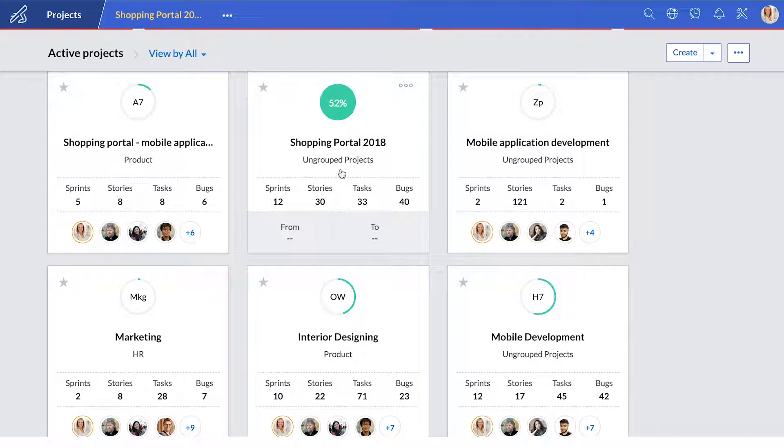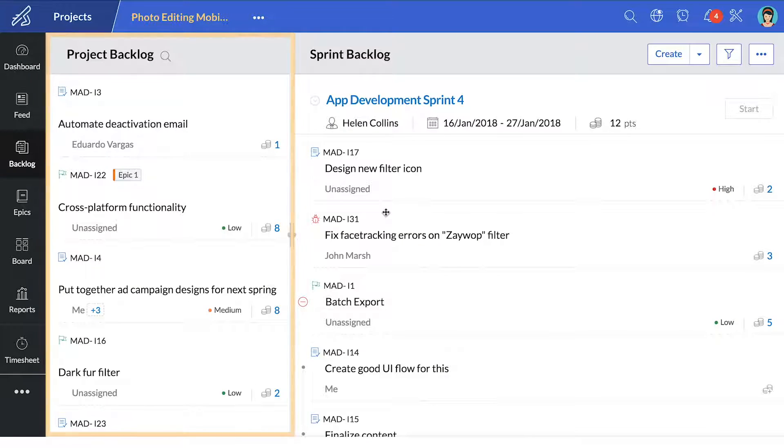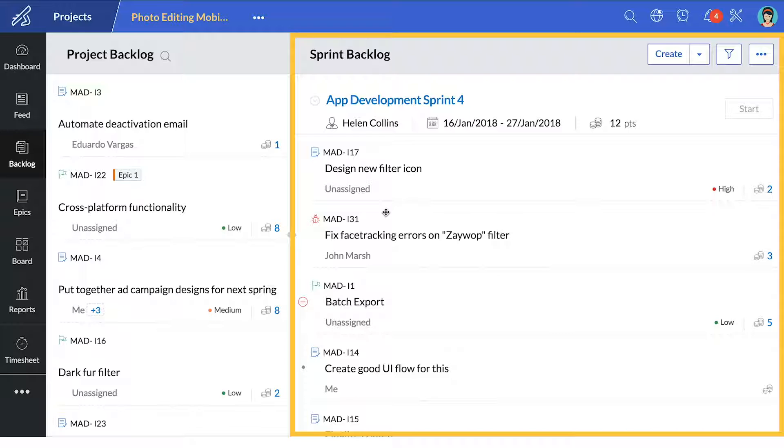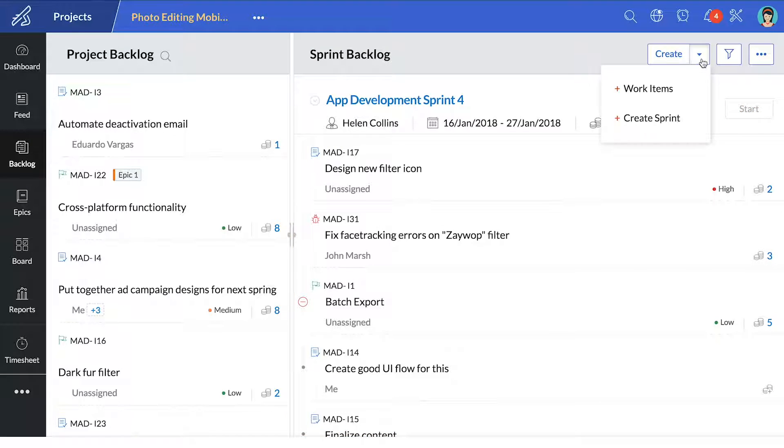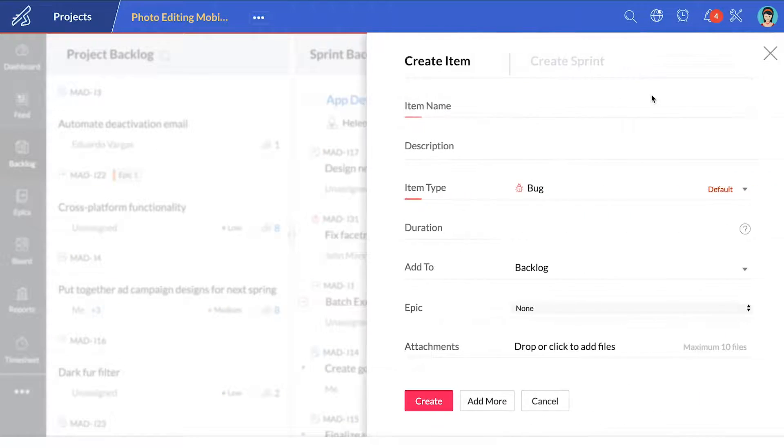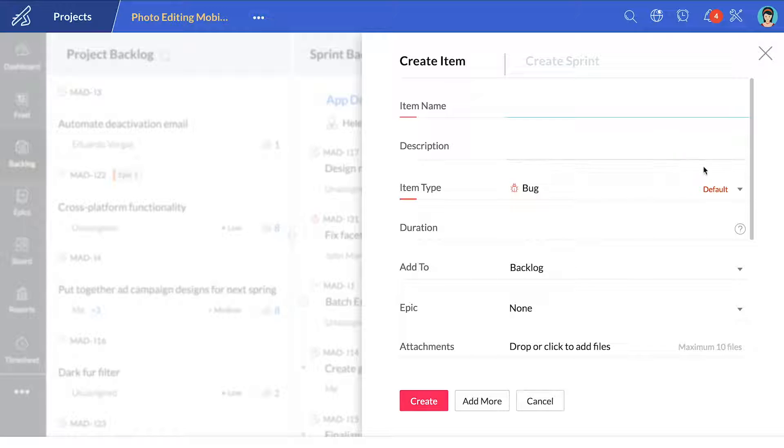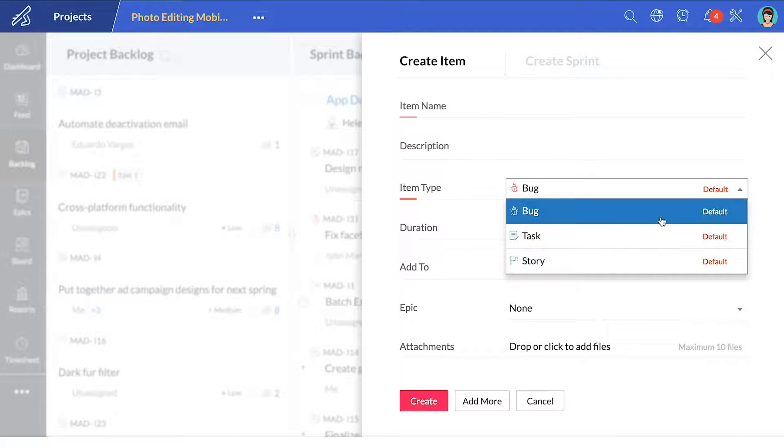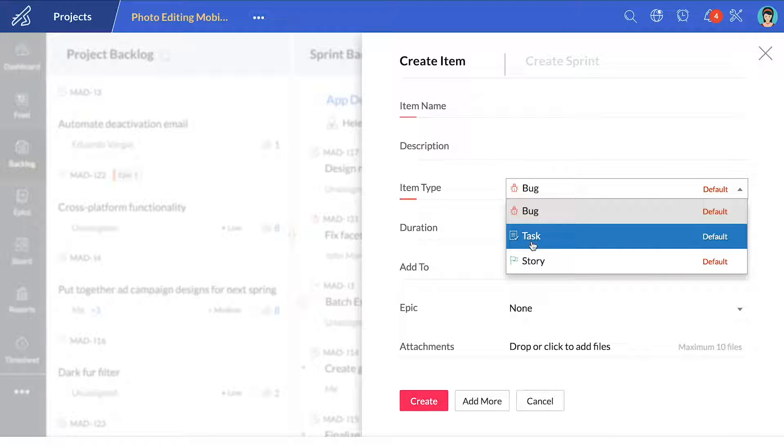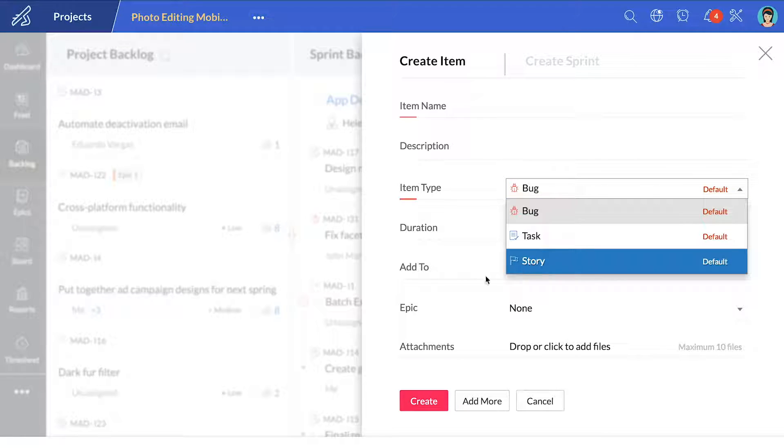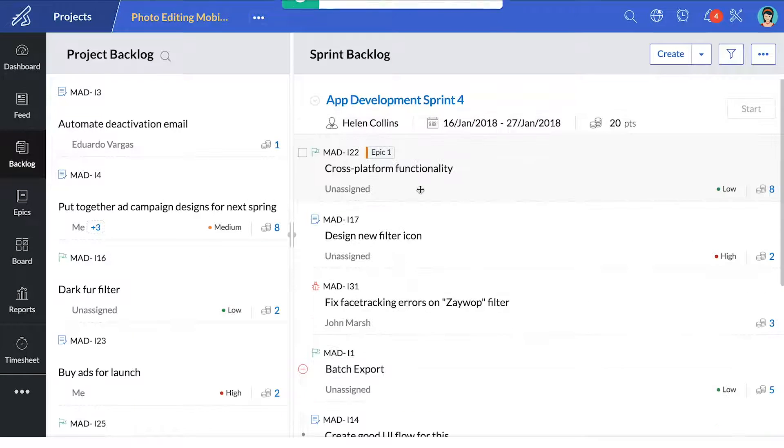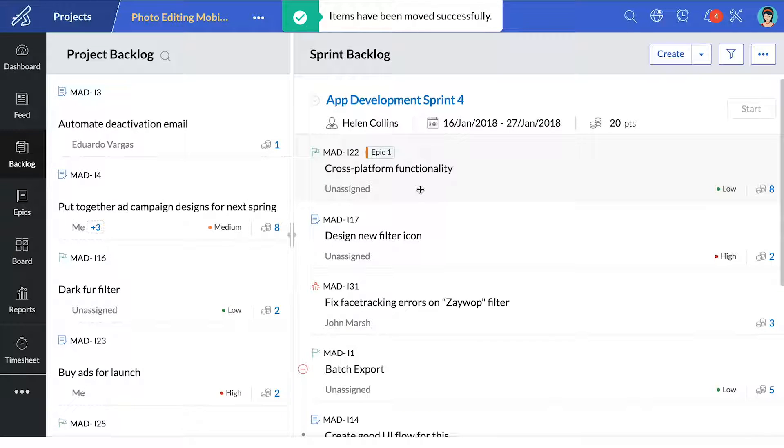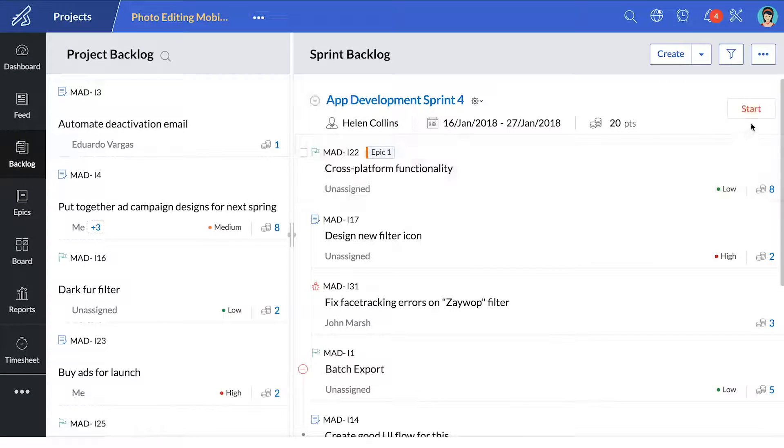In an active project, you have your project backlog and your sprint backlog. You can create work items for your project backlog and Zoho Sprints lets you define them as a bug, a task, a story. Simply drag and drop tasks to the sprint backlog and start sprinting.